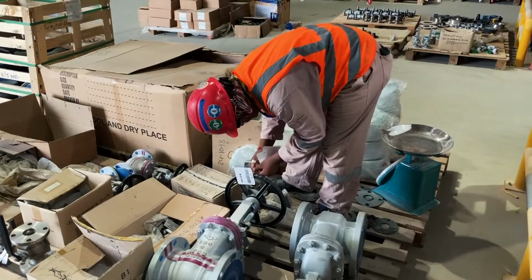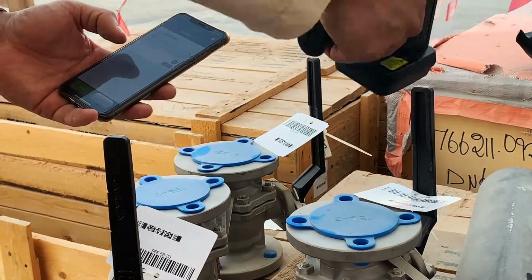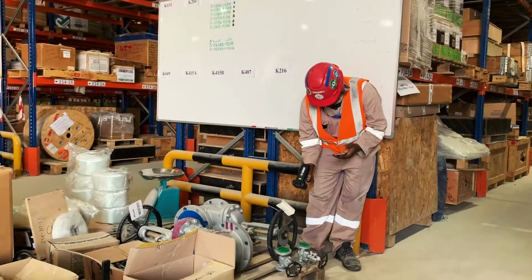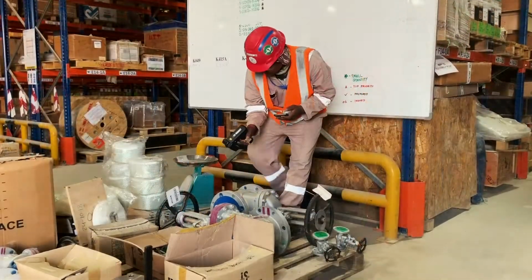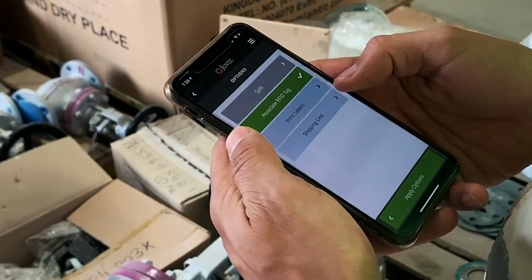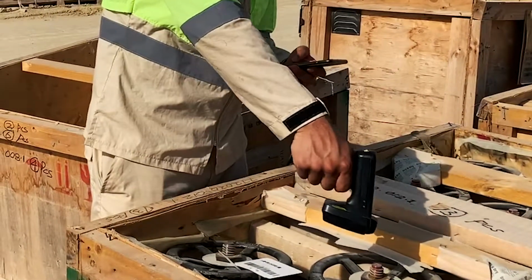By identifying all the subcomponents to pump 201P001 and tying them back to the work plan, the materials management team is much more likely to fully issue all of the necessary components to the construction crew, keeping them on track and lowering the material constraints and disruption. The responsibility for managing supplier data is placed where it belongs, with the supplier.